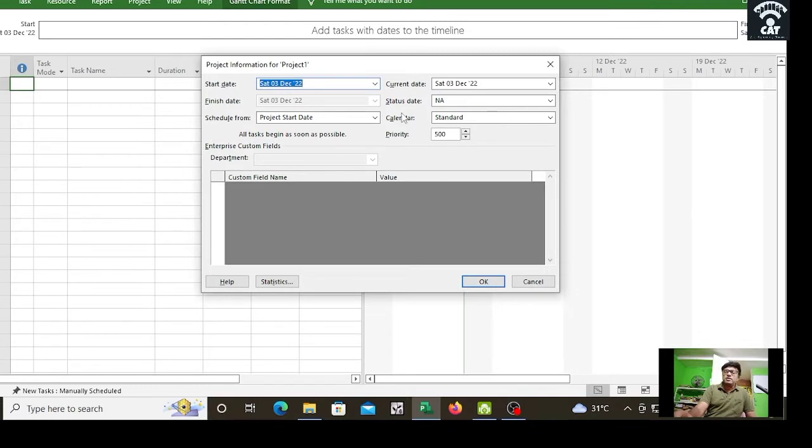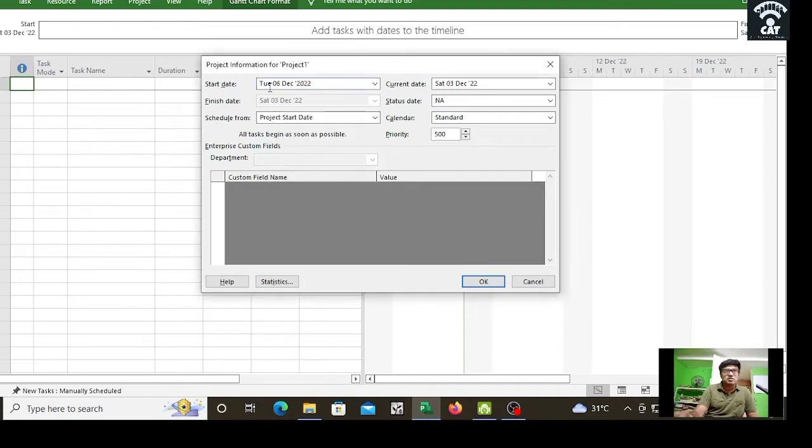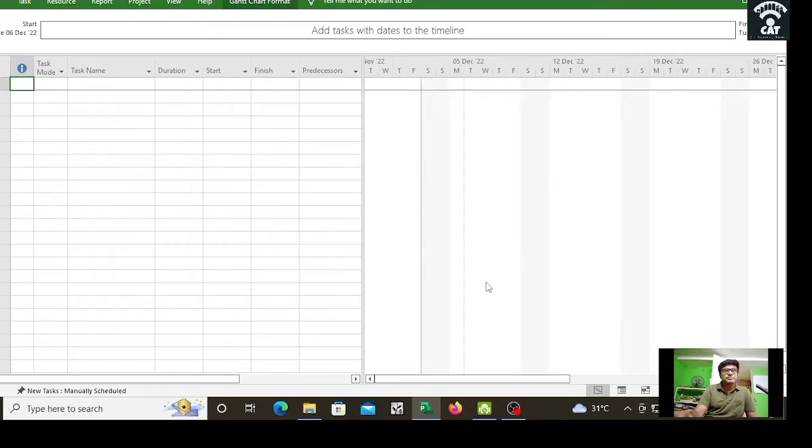I already said that automatically it will start from the day on which you are now. Today is Saturday, 3 December, but I said that I want to start it from December 6. So click here and click on 6. It's Tuesday, 6 December 22, that I want to start. Current date is Saturday 3. Start date is this one. I have to click OK here. I clicked OK, so now the project will start from December 6. You can see this line on the Gantt chart. So if I put a task here, it will start from December 6 only.